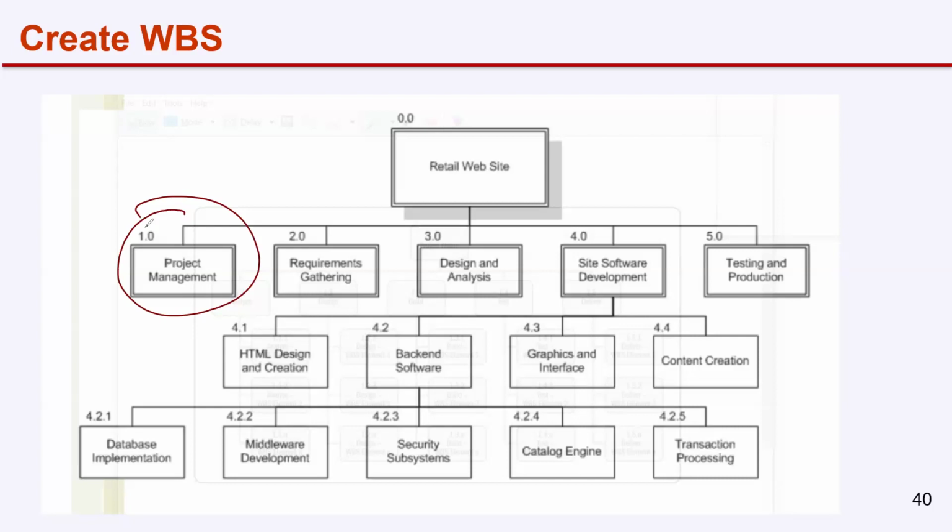Generating reports, going for site inspections, or depends on the project, like checking and so on. Put it under project. In monitoring and controlling, you are conducting monthly meetings, generating and transmitting the reports, managing changes, all these put there. Closing, again, preparing the final report, handover, everything can be put under closing in project management. So keep that, as that's a good practice.